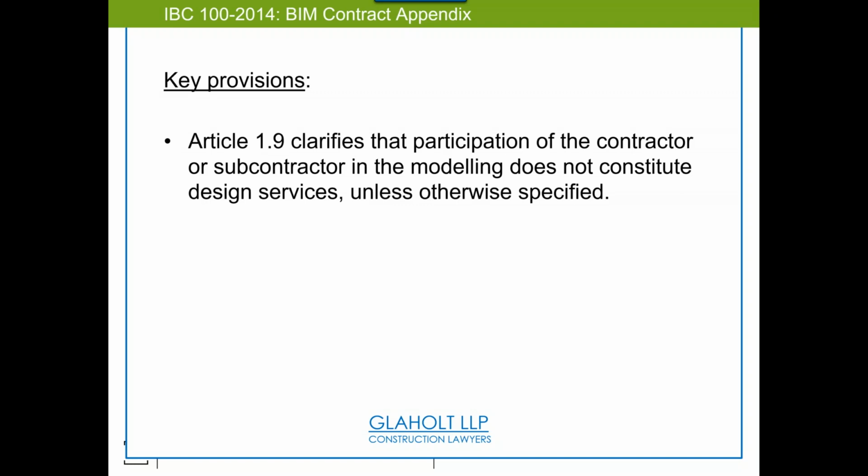We clarify the participation of the subcontractors and the contractors. That when they're participating, they're not designing. And that's important because there are rules against that, especially in the design, bid, build world. But we want the contractor to be involved. We want integration. This is the point of BIM, lifecycle data management. I'm doing something in design. I would love a contractor to say, you know what, that won't work. Could you please do A, B, and C? Constructability review, all important.